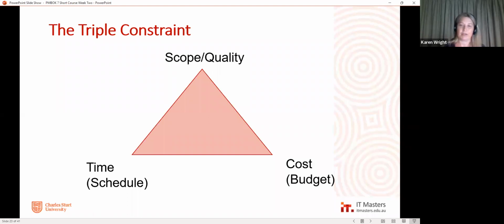So I'd recommend that you try to approach it with scope coming first. Scope is king, is the saying in project management, and then quality requirements, and then try to fit that to your schedule and your budget. You've got to work it a bit to make it all come together, if that makes sense. And then ultimately it's up to your project sponsor or steering committee to sign off on it all. But that then gives you not only, as I said before, the guidance for your project team to adhere to along the way, but also the benchmarks for what you're going to be measuring your performance against as well.